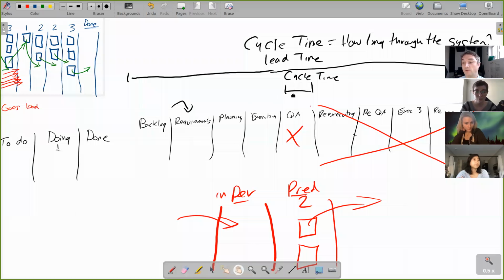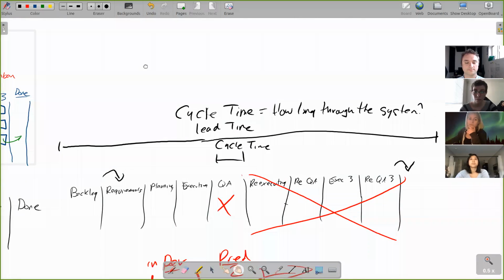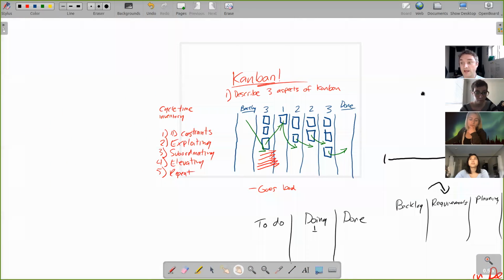Although Kanban really isn't rigid. It has no opinions about what your process is, only how you visualize it. Whereas if we think back to the Scrum talk from yesterday, sprints are between 1 and 4 weeks, but they average 2. On the first day of your sprint, you have a meeting where you take your backlog and you size them.